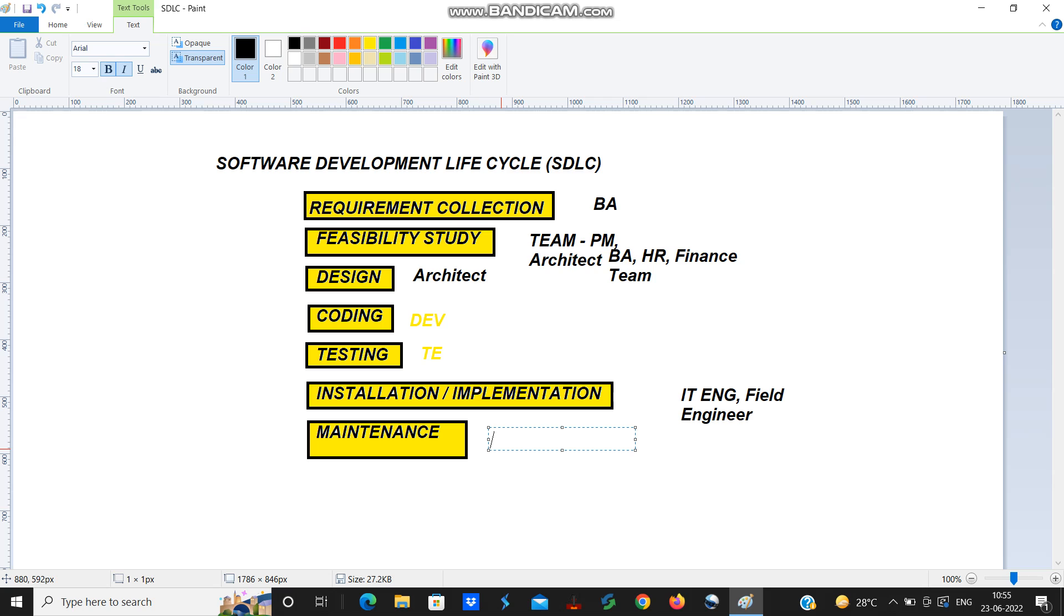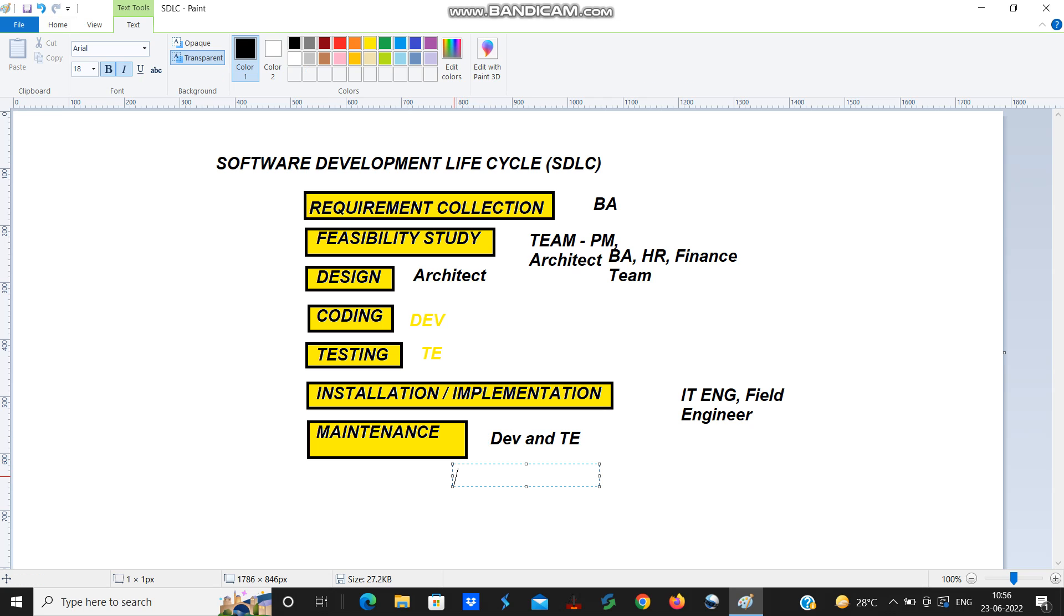If there is any problem that will emerge after all this process, we have our developer and test engineer who will be doing the maintenance. There will be an agreement between the customer and the company, like a maintenance period of six months. After the software is given to the customer, for a period of six months, if there is any error in the software, our developer and test engineer will try to fix it.